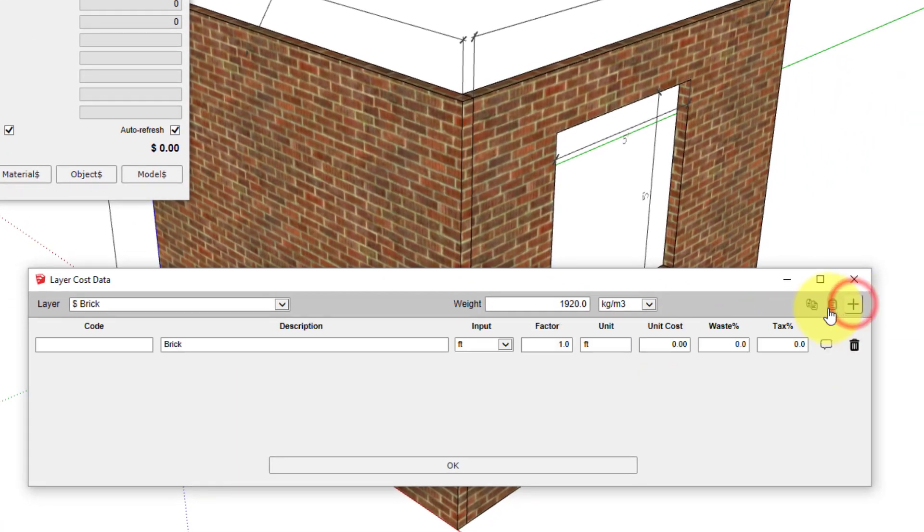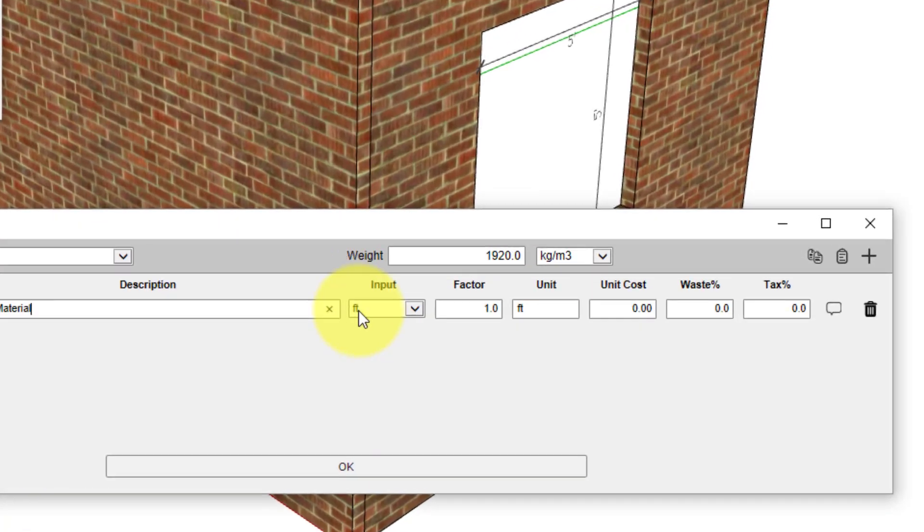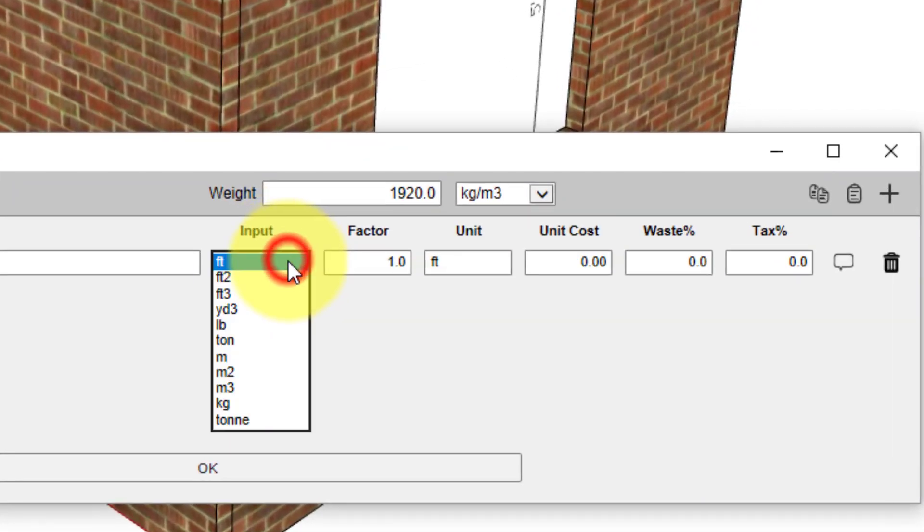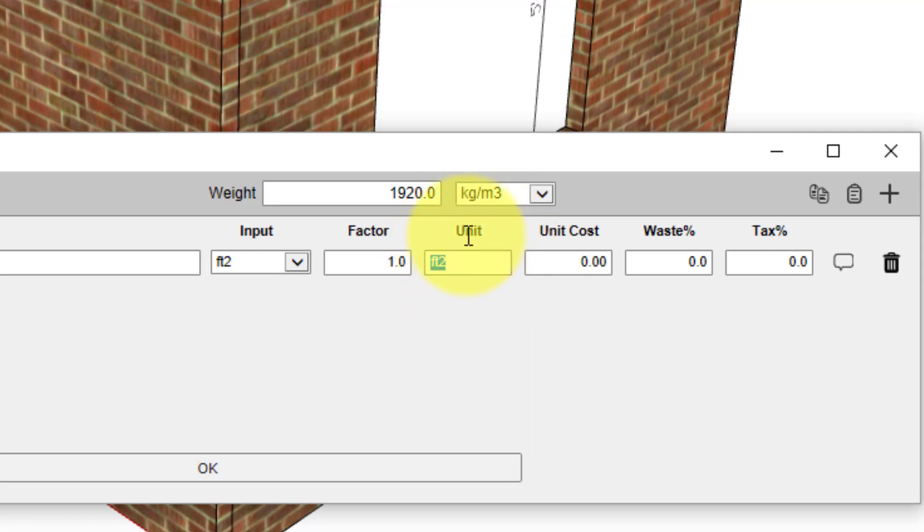Cost codes are optional, but we will just put in a generic cost code called Brickwork. This line in particular is for the brick material. In this case, we know that there are seven bricks per square foot, so we want the quantity reported to be number of bricks.